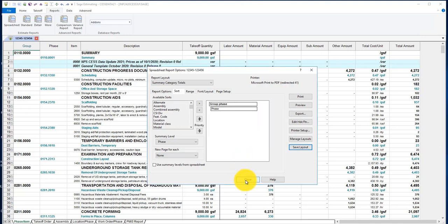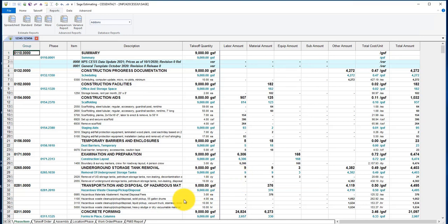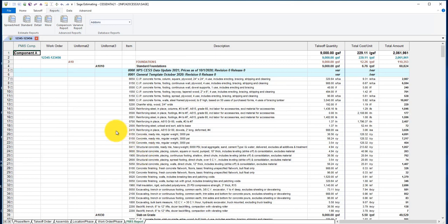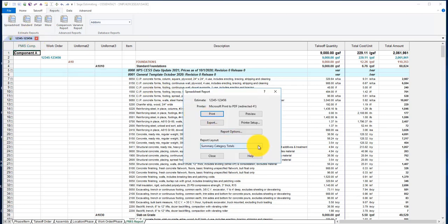So from now on, regardless of the state of the spreadsheet, we could be sequenced over here by PMIS report. The spreadsheet can be in any state. The trick then is when you're in reports, to get that spreadsheet report out, you've got to click Spreadsheet. That's the key. Click Spreadsheet, and from here on, all we have to do is look at our list of managed report layouts, and we don't have to do any configuration. We just pick the name that we've built in our personal report layouts, export.